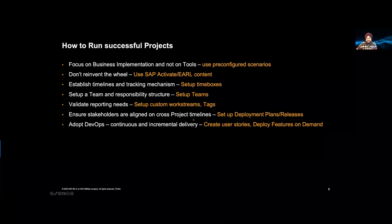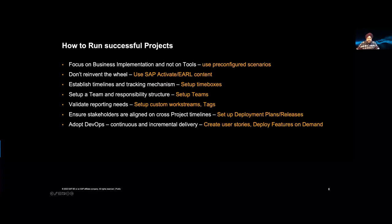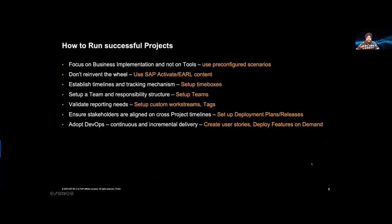Cross-project coordination happens via the deployment plan, which we'll see shortly in the system. Continuous delivery is implemented by breaking requirements into very small pieces called user stories, which fit into a sprint — also called a time box — and then features can be deployed on demand. These are some of the key hints for running projects successfully.